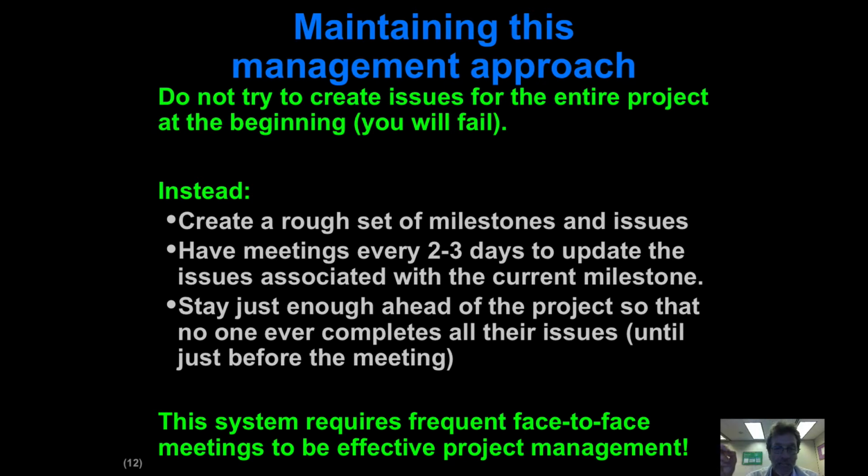Maybe some tasks are more difficult than you thought, so you've got to revise them to be smaller or split them into 2 tasks. Maybe somebody's going faster than they thought they would, so they've been idle for the past couple days, so now you get a chance to reallocate them to something else.